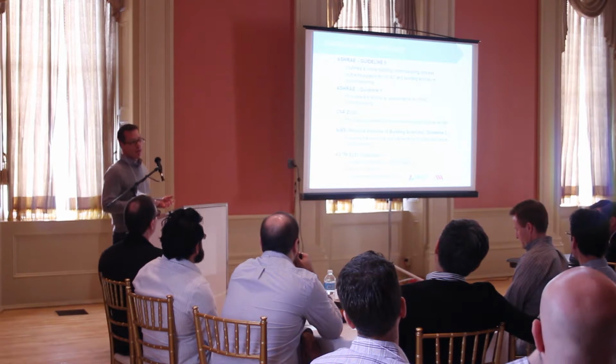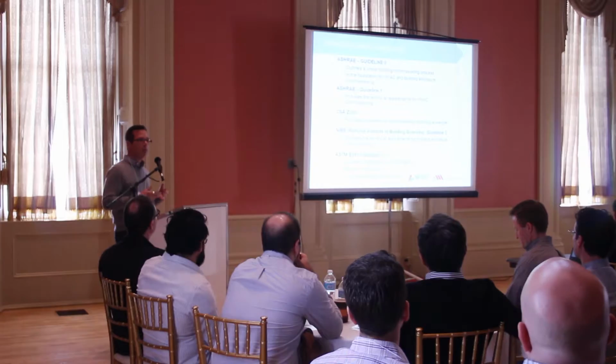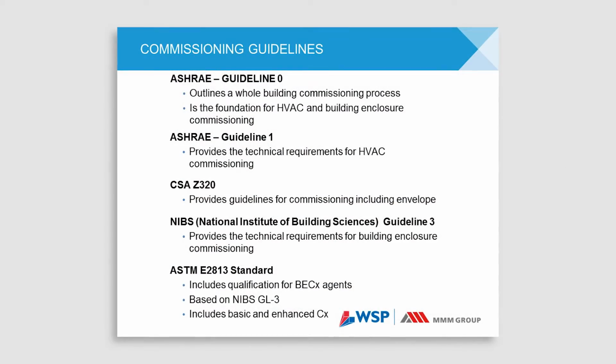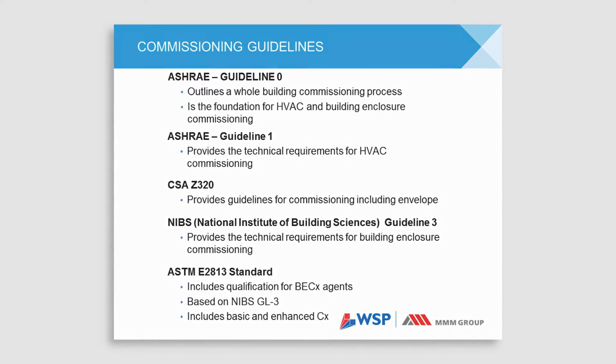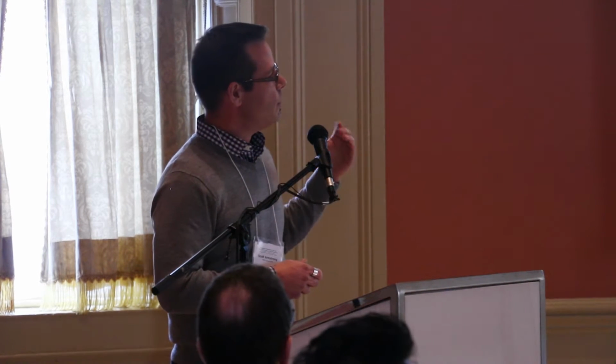There are lots of guidelines to help understand commissioning, to help determine the process and the people who should be involved. Here is a list of some of them. Typically we focus on CSA Z320, that's the one in the middle. It is an excellent guide. It has very specific requirements. One thing that I would highlight too is ASTM E2813. It's an ASTM standard, so you could put it in a spec, and it is a standard that is required to be met, whereas some of these others are guidelines, and guidelines have language like shall or may. The ASTM standard is a standard.